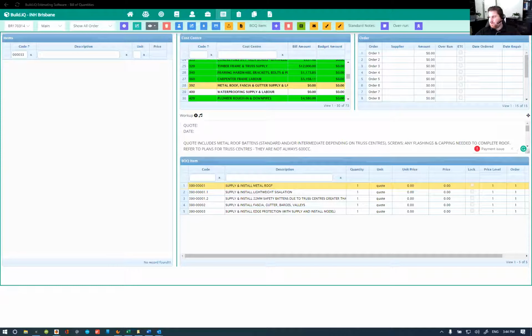This house, however, was $9,810. So, sorry, plus 1010 plus 940. So on that basis, we're pretty safe saying that your roofing is going to be about 60 to 65 dollars a square meter.